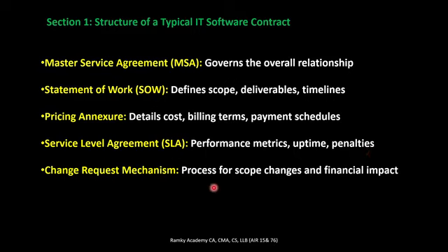Change request mechanism: the process for scope changes and financial impact. Any change request will be informed in advance. If a change request comes which is not agreed in the SOW and is outside the scope of work, it will require a change request and will be executed on top of the SOW.